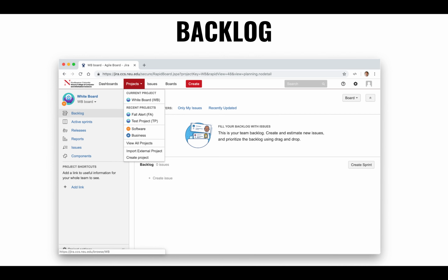Based on your particular use case, right? Each team will have a different use case. And you'll create these and then assign them to that sprint. Now the sprint planning meeting might be anywhere between an hour or 2 hours, depending on how big the team is and how much work, how long the sprints are. But after that sprint planning, the Scrum meetings usually are very short, right? Anywhere between 5 and 15 minutes should be enough for daily Scrum meetings. So you would literally drag this into the sprint.